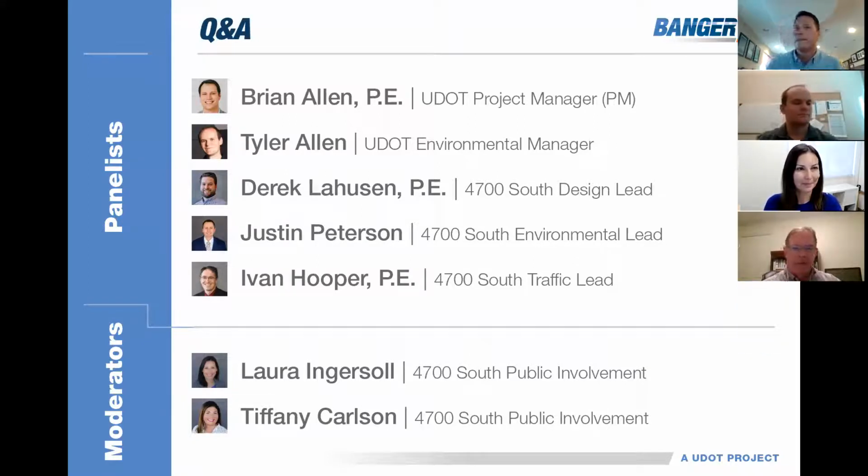Yes, if we're acquiring a property in total, the minimum requirement that we would do is 90 days. However, we always try to give the maximum time available to give owners plenty of time to relocate.